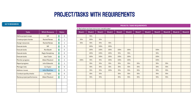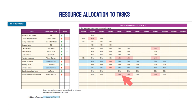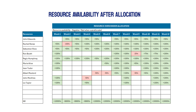The tool works with two components. First, a project with requirements based on periods — those periods could be days, weeks, or months. Then you have a resource list where you input resource availability, including leave, part-time work, or when a resource is working on another project. You can then start allocating resources to your tasks and immediately see if there is a resource conflict — the task will be highlighted in red and the resource symbol will also show in red, which is the Microsoft Project standard. The system also tells you how many weeks are in conflict for a specific task.